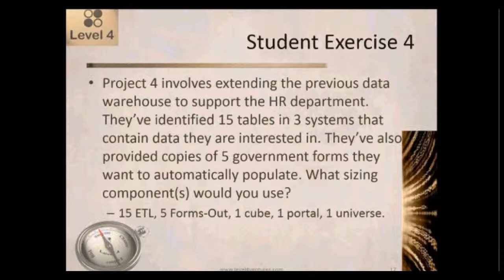When you're writing the ETLs, you're normally going to be dealing with different systems. The number of source systems may in some cases have an impact on the complexity of an individual ETL, but would not impact the number of ETLs. Let's say I was doing one ETL and my source system was a simple database in Access. That might be a low complexity ETL, fairly simple. Let's say another one was a very complicated table structure in ISAM running on a mainframe. Well, that may be a much more complicated ETL, but it's still just one ETL.